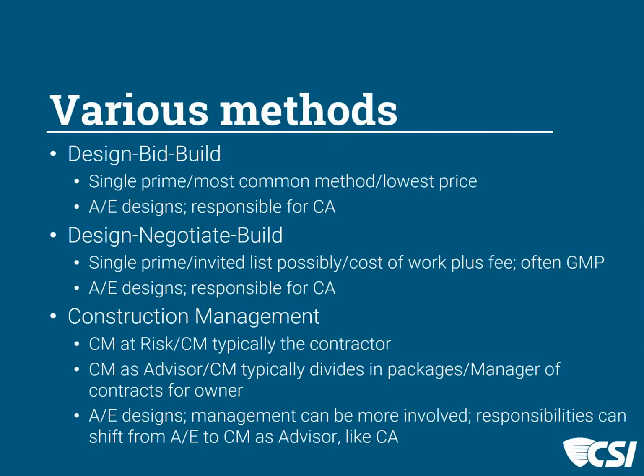The majority of the experience that I personally have had, and that of Doug Freeman, my cohort with these webinars, is in the design, bid, build market, where there is a single prime contractor. It's the most common method that is used within our state anyway, and projects are awarded on the lowest price.